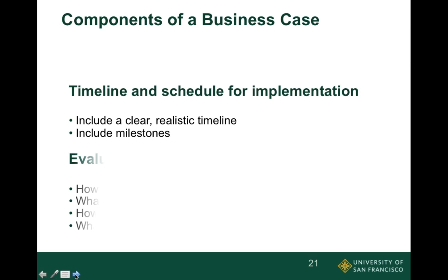So you need to know when your hospital or school is in the budget cycle. Because if budget is needed for this program, and most likely it is, you want to get it in the budget. So find out when the budget cycle is and create a Gantt chart on an Excel document or another project management tool that you would find online to map out the timeline and schedule for implementation.